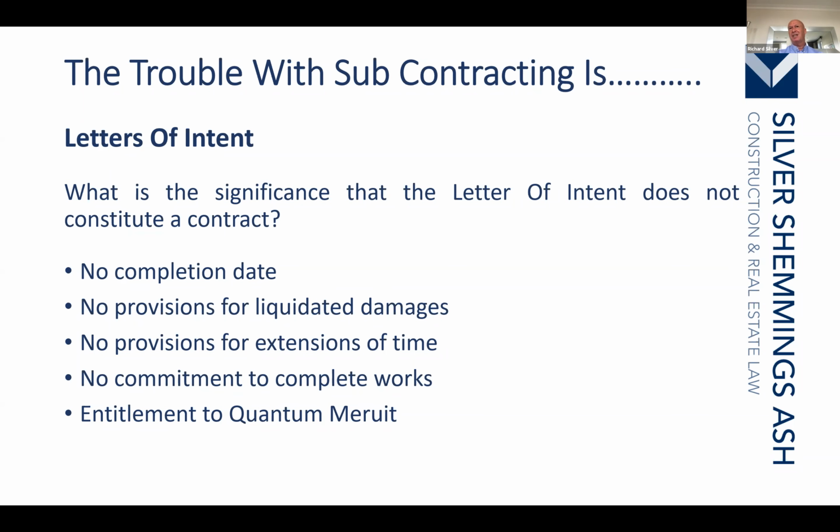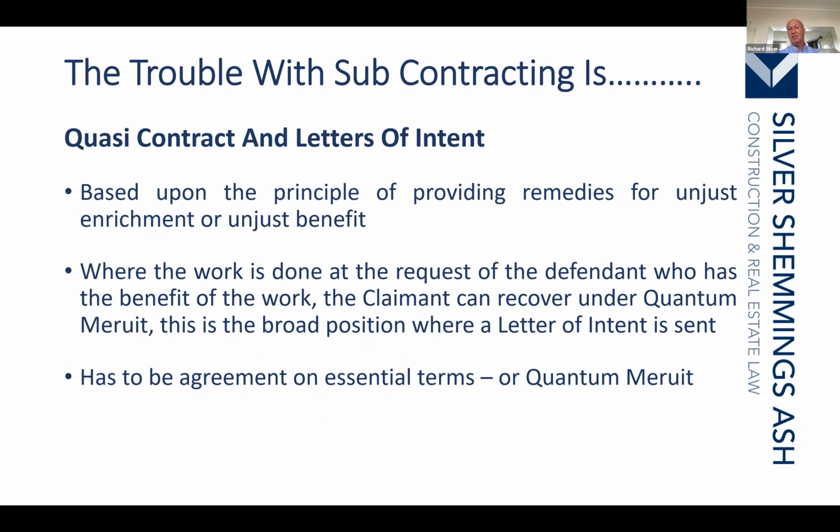If and when the contract is entered into, this will have retrospective effect. Well, the simple point is it hasn't happened yet. And we've already identified that a party can withdraw their tender any time before acceptance. But it hasn't been accepted, so they can therefore withdraw their tender. There is no contract in place. There is simply what is called a simple contract. And what happens is that there is an entitlement to quasi-contract. It's an area of restitution where the subcontractor is entitled to a reasonable amount.